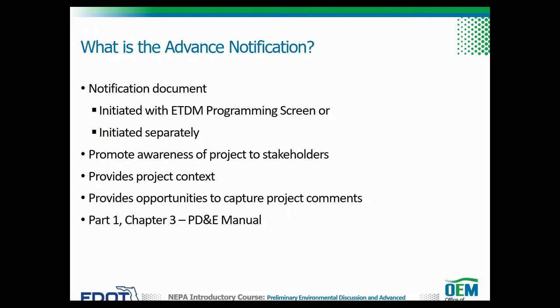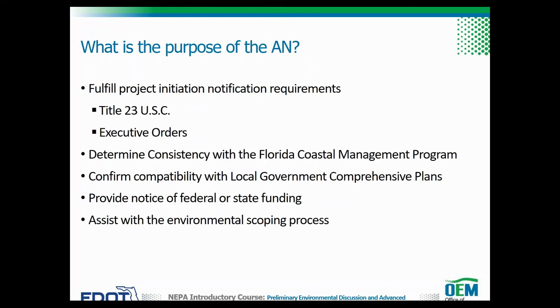The AN can be initiated with the ETDM programming screen or initiated separately, typically closer to the start of the PD&E phase. An AN promotes awareness of the project to stakeholders, provides project context, and provides opportunities to capture project comments. The AN preparation and procedure is provided in Part 1, Chapter 3 of the PD&E manual.